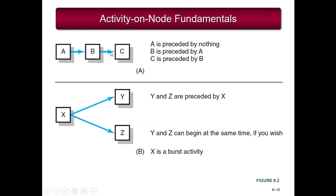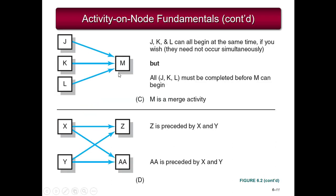The fundamentals slide shows that A has no predecessors, A precedes B, B precedes C, and C is the end — so A is the start and C is the end. In the second diagram, X is a burst activity with two nodes, Y and Z, depending on it. Another example shows that J, K, and L have no predecessors and no relationships among them, so they could start at any time. They all precede M, and all of J, K, and L must be completed before M can begin — M is also known as a merge activity.